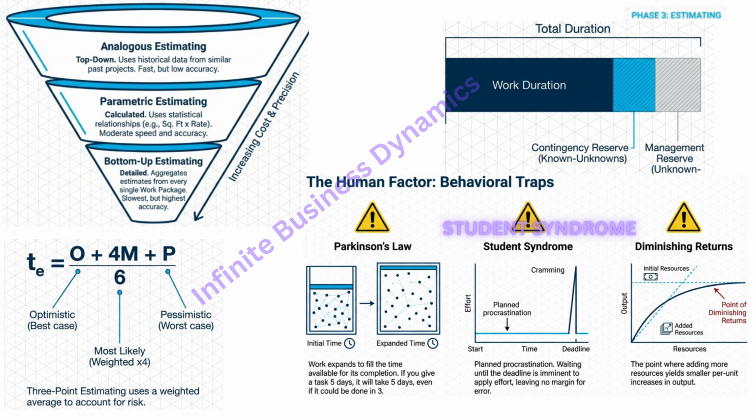Which leads right into student syndrome. We all did this in school, right? You have a paper due in a month. You start now? No. You start 3 days before. You wait for that urgency to kick in. In project management, this just destroys any buffer you built in because any unexpected issue at the very end will make you late. And then there's the law of diminishing returns. This is the mythical man-month concept.